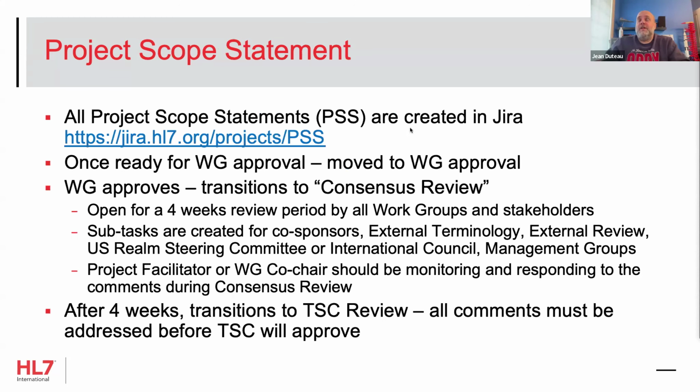And again, those are created in Jira. And here's where now the work groups start to get steps where they need to be approved. So the sponsoring work group. So let's say I've created this and pharmacy is the sponsoring work group. Before anyone else can start the process of looking at it, the work group needs to approve it.